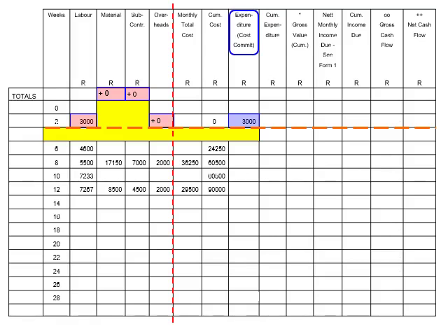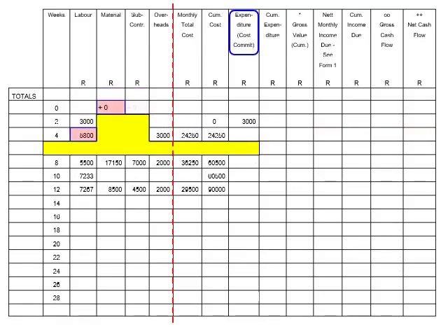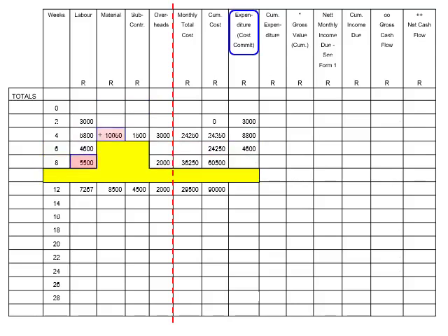To calculate expenditure for week 4, all you need to do is move the template down, so that week 4 is revealed. Then, again, add up the amounts just above the template. The total to be recorded for week 4 is 8,800 Rand. Do the same for week 6, where the total to be recorded is 4,600 Rand, and week 8, with a total of 19,950 Rand. Continue this process for week 10,